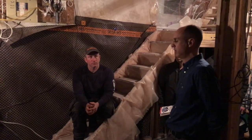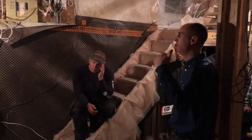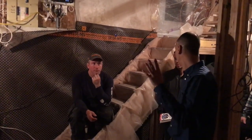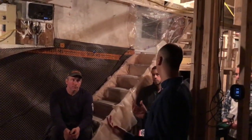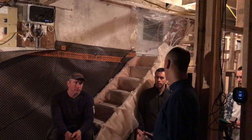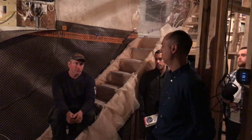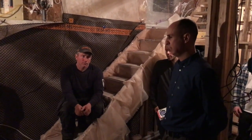Yeah, I think fire, correct me if I'm wrong, but it's retrofitted. So if something changes in the rules for fire, and now interconnected smoke alarms are not enough, you need something else, like those strobe lights. If I have a legal duplex and a triplex, but I don't have strobe lighting because back then it wasn't required, do I still need it? No. If you do open a permit to do further renovations, if there are things that can be upgraded that don't incur significant costs, inspectors might request it. But then it depends on the actual writing of the new regulations and investigating if it's actually required or if it's just highly recommended.